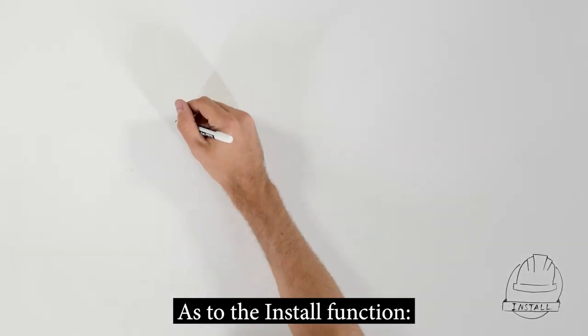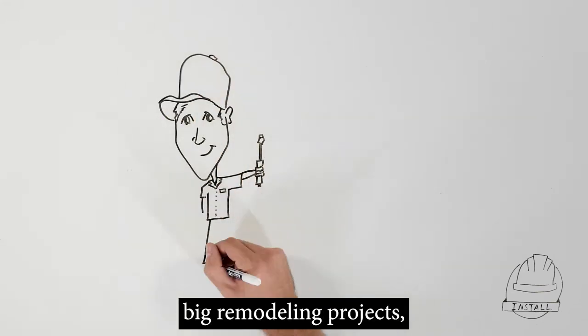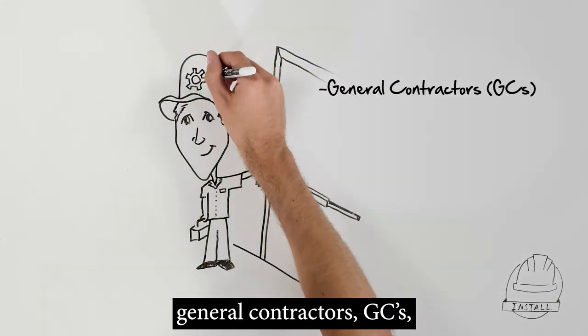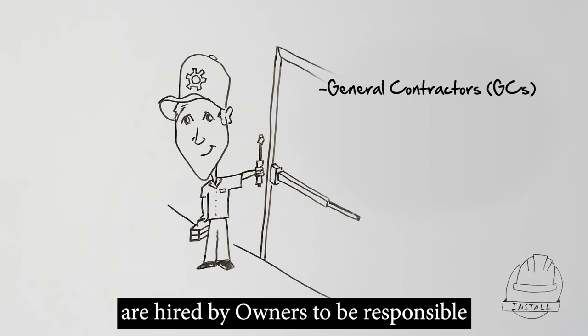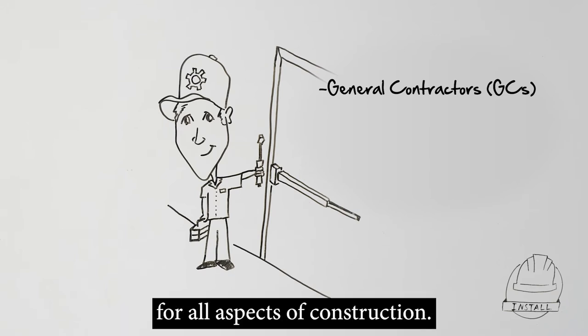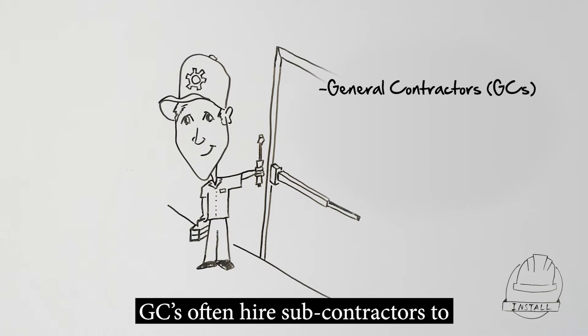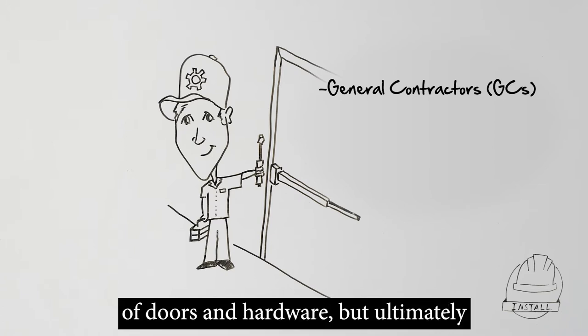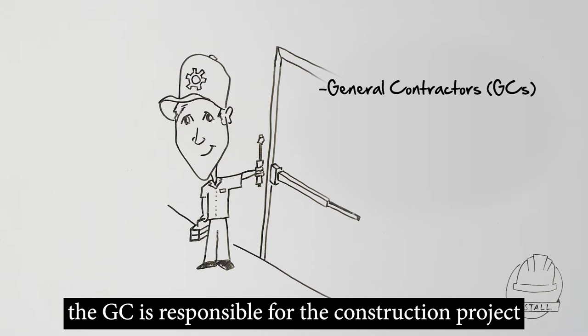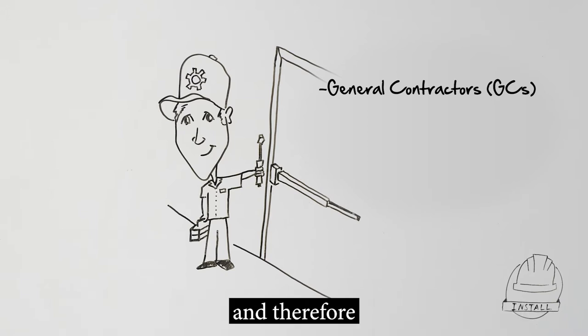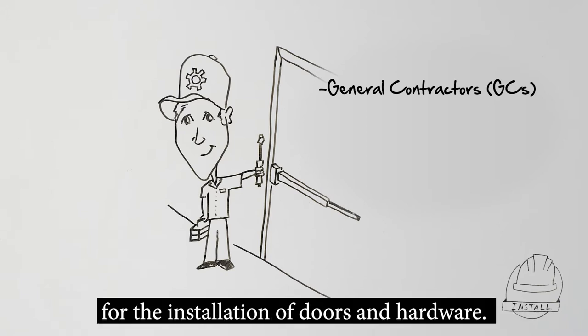As to the install function, for new buildings and many big remodeling projects, general contractors are hired by owners to be responsible for all aspects of construction. GCs often hire subcontractors to do some or lots of the installation of doors and hardware, but ultimately the GC is responsible for the construction project and therefore for the installation of doors and hardware.